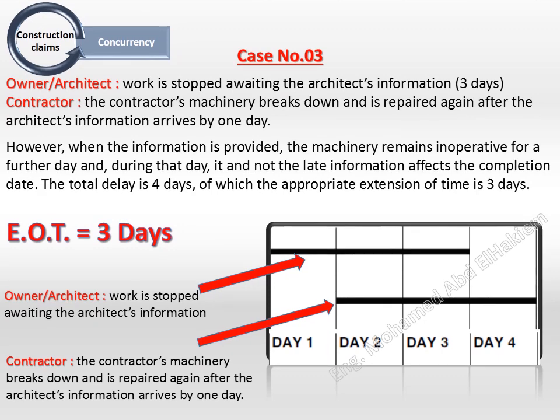Case number 6. Owner situation: work is stopped awaiting the architect's information, three days. Contractor situation: the contractor's machinery breaks down and is repaired again after the architect's information arrives by one day.